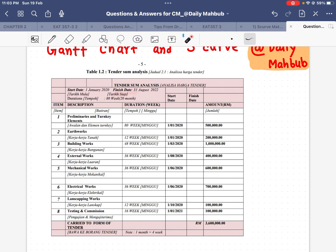This project started on 1st January 2020 and finishes on 31st August 2022. We know the starting date but not the finish date — however it is easy to find. Since the durations are given in weeks, I have to convert weeks to months and then add from the starting date to get the finish date.